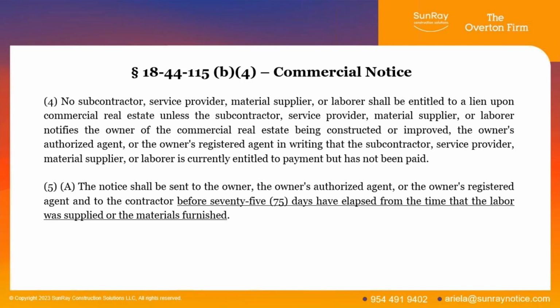you normally don't get paid immediately, because you'll turn in your pay app by, say, the 25th of June. The contractor turns that in on the 10th of July to the owner. Then the owner will pay that by the end of July, maybe. And then they will turn around and pay that out in August. Well, you've already used up most of that 74 days. If there's any kind of a hiccup or delay, like I said, that 74 days comes quick.